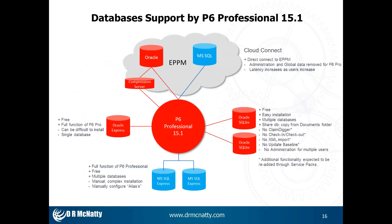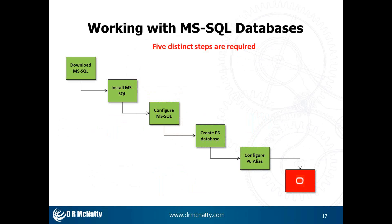This slide shows the supported databases through P6 Pro 15.1, either using Oracle applications or Microsoft SQL. The supported local databases include SQLite, Oracle Express, and SQL Express. For working with Microsoft SQL databases, there are five distinct steps required: download Microsoft SQL, install SQL, configure it, create your P6 database, and create and configure your alias for P6. Once those steps are complete, you'll be able to sign in and start using P6.